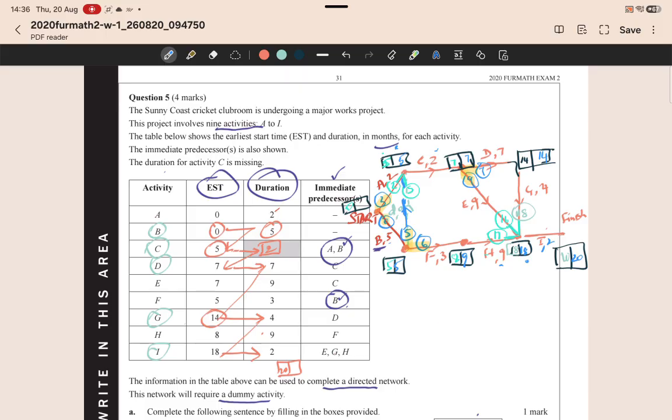Okay. So now let's look at it and see which activities, when reduced, will reduce the minimum completion time. So the project can be crashed by reducing the completion time of one activity. Now, according to this table, the critical path activities are B, C, D, G, and I. And I've highlighted them in yellow over here.